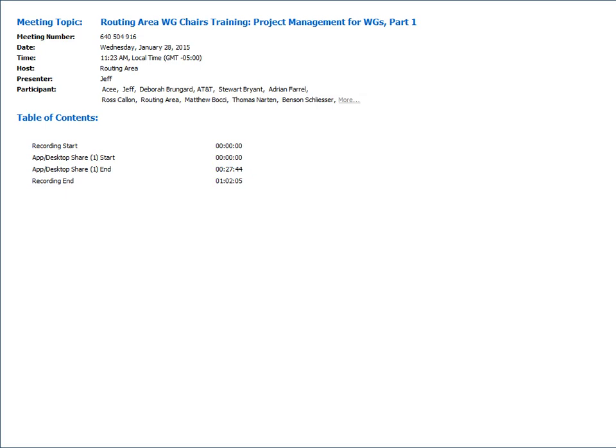And so, if you look at it from a project management perspective, again, go back to a document. You have easily 3 to 4 months between IETF meetings. There's no reason why you can't get at least 2 revisions between IETF meetings, and preferably 3. And part of the problem is that people save up changes to the very end because they're like, oh, it's not worth doing the revision because there's not much text.